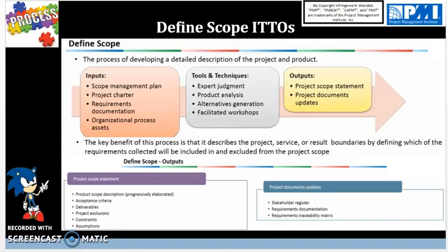So those are assumptions. Risks are things that we are uncertain will happen. We don't even know it's going to happen, but we plan for it in risk planning. So a certain risk could be, for example, if the database does go out, what do we do? We're going to have a mitigation plan in the risk management plan to ensure that the risk is taken care of. Constraints are things that are going to prevent us and hinder us from moving forward.